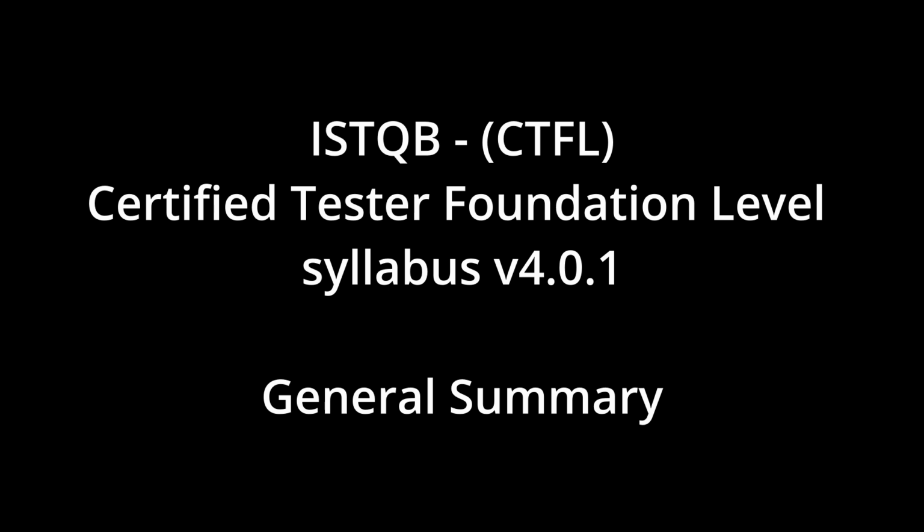The syllabus mentions a few common ones. There are ratios-based techniques where you use historical data from similar past projects, like the ratio of testing effort to development effort, or defects found per KLOC to estimate the current project. Extrapolation involves measuring progress and effort spent early in the current project and then extrapolating that to estimate the remaining effort. What about using expert judgment?